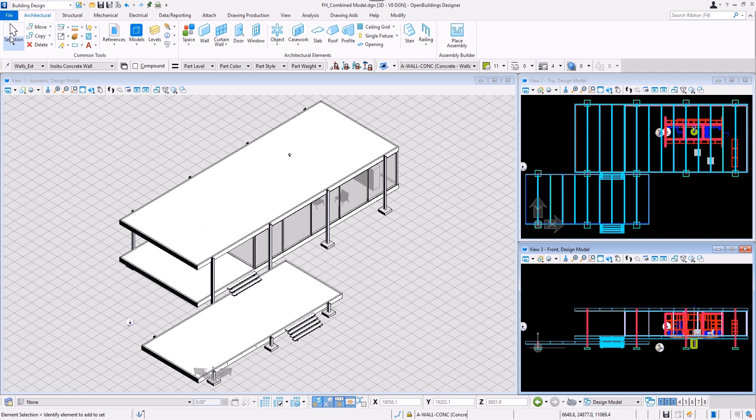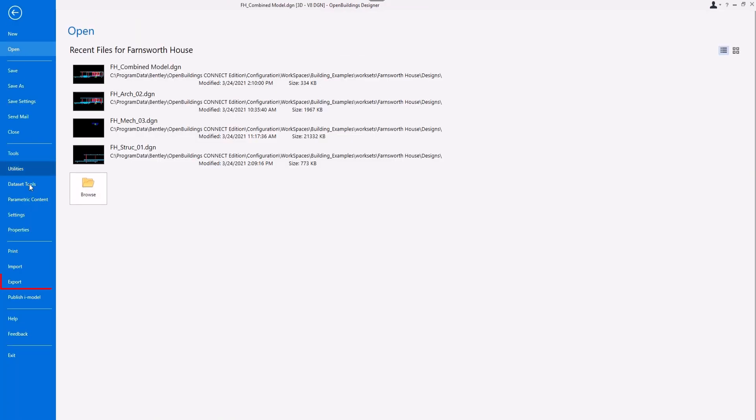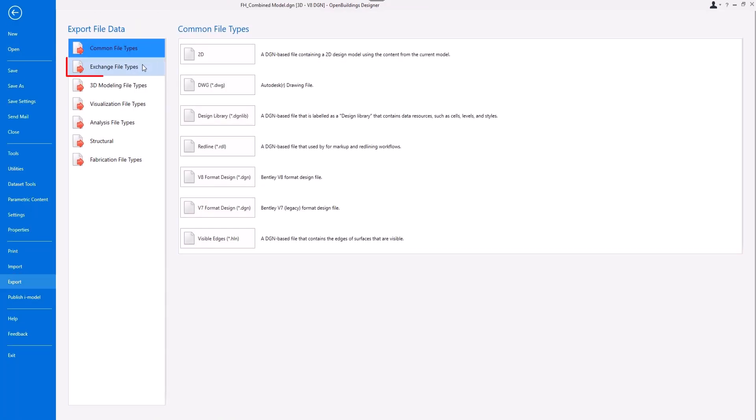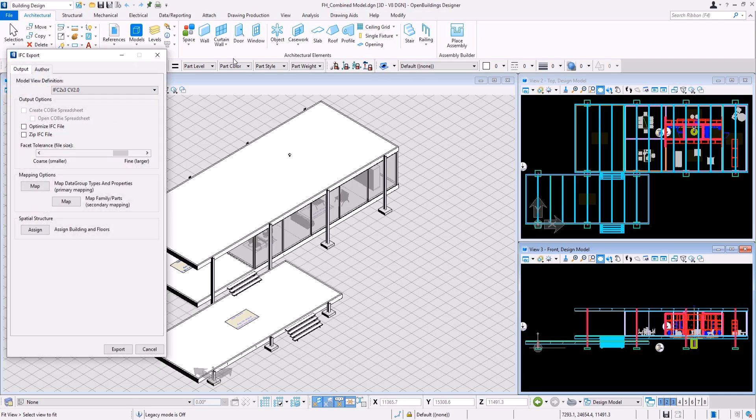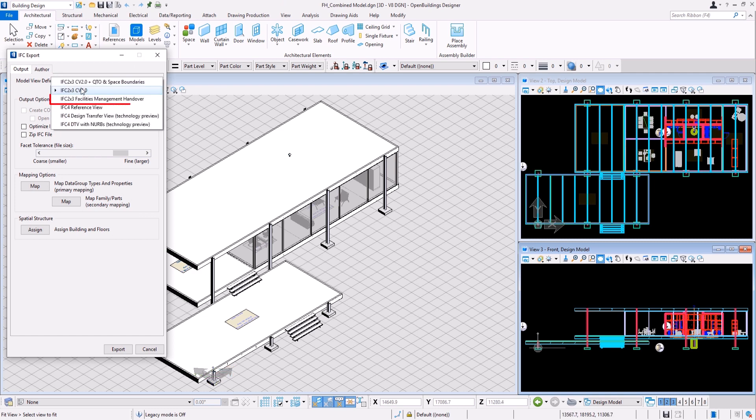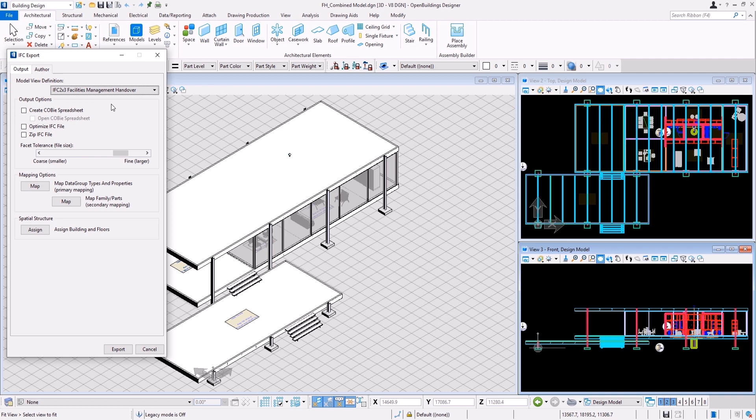When the model is upgraded, go to File, Exchange file types, IFC export. In the dialog box, select the IFC 2x3 Facilities Management handover model view definition and then select the option to create COBI spreadsheet.